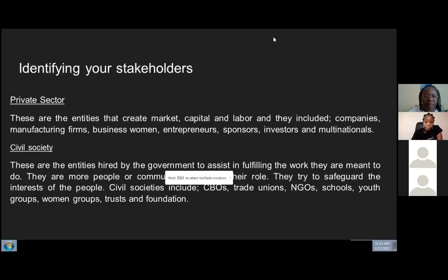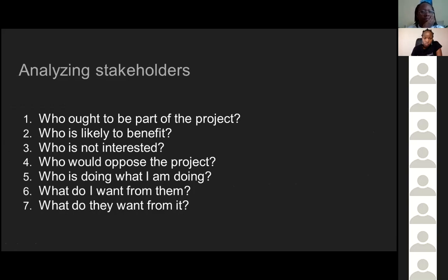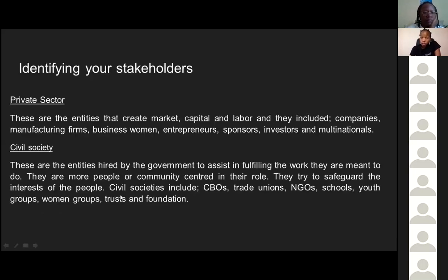From this, I learned that even though we are dealing with the person who owns the title deed or the landowner, we also need to extend our participation to the other family members so that we can have their view, because maybe that land is inherited. There are people who have shares in that land and we are not aware. So through this, we learned that we should involve other family members so that we can have their views when it comes to land acquisition. Absolutely. And that's a very, very important thing.